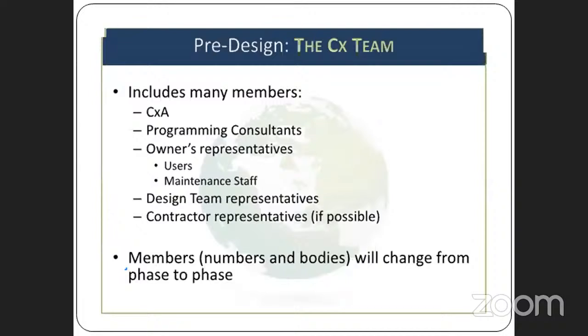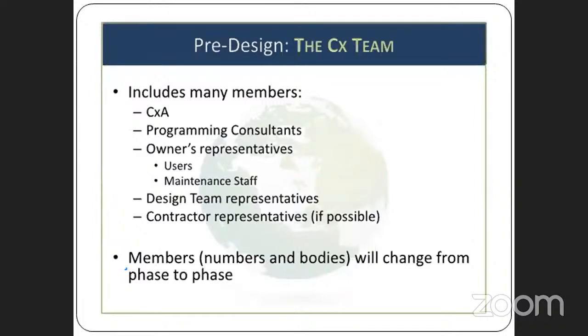Next one is design. In the pre-design team, who are on the team? First one is CxA. CxA means commissioning administrator. And the commissioning administrator should be the head of the team. Then owners, consultant, then the design team and the contractors. This is a group task.